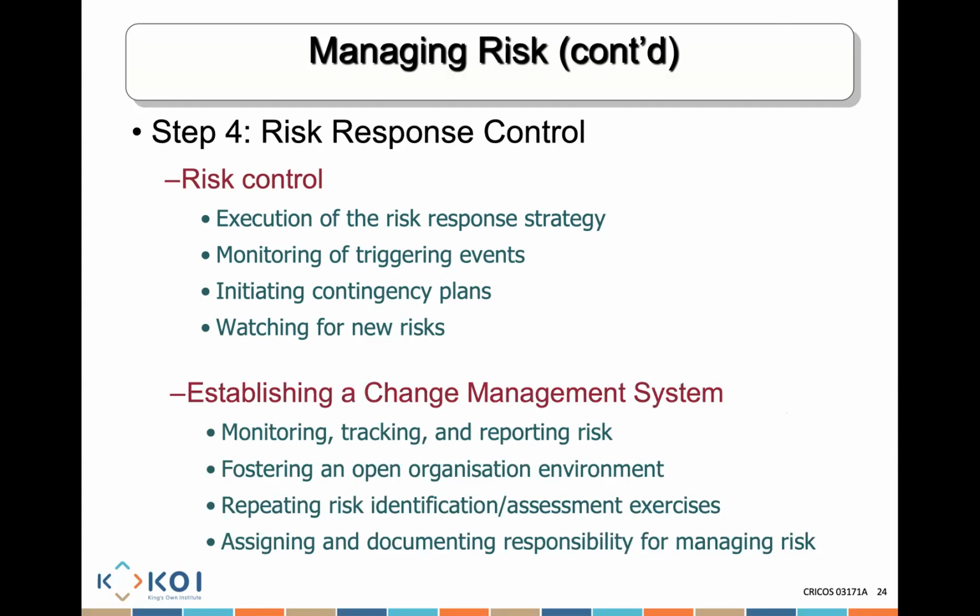A change management process is one that is very important in the organization. Whenever any change is going to happen, there are always plans of monitoring the impact of that change: the cost impact, the time impact, the technical impact, the human impact. We have to monitor all of these things that could impact on our project. So we monitor our projects, we track our risks, we monitor and track changes and report any risk that might be anticipated by making a change within my organization.